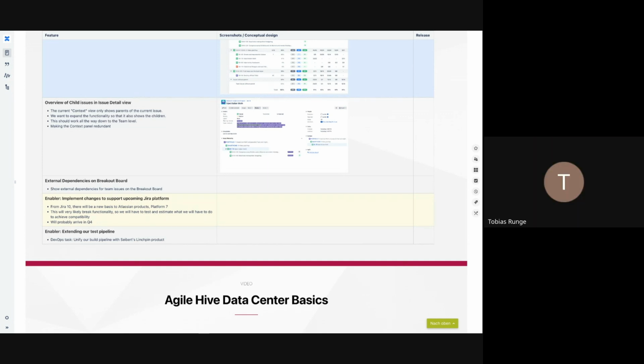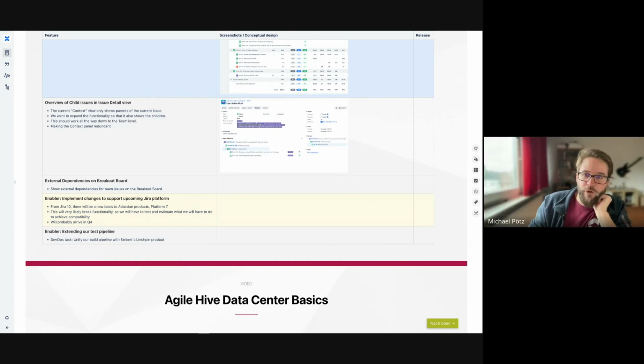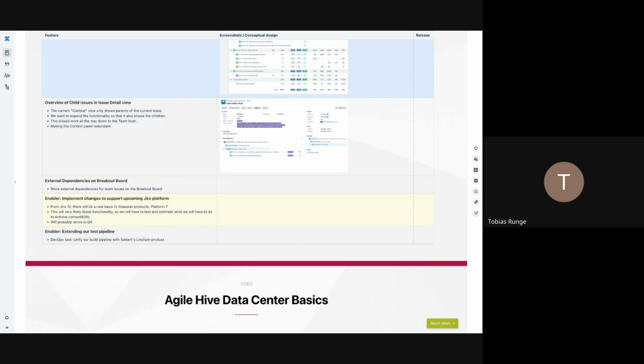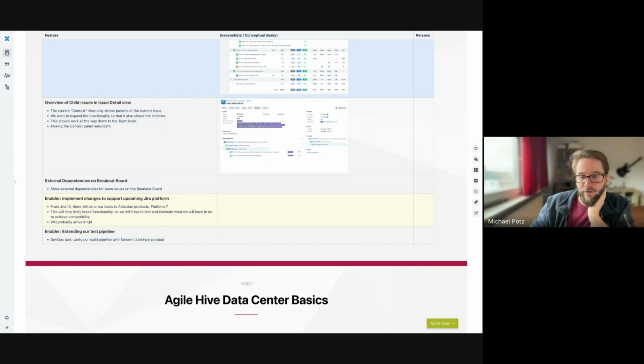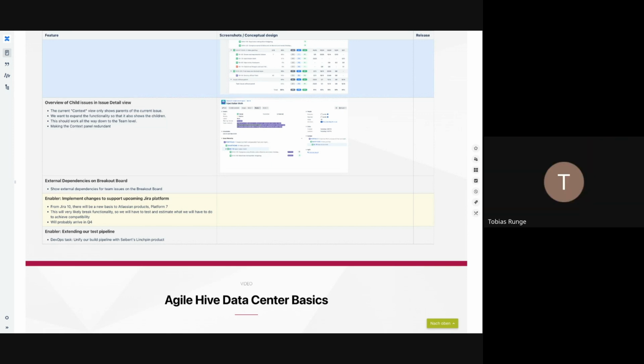Okay. For the ART report, we could show them as the independent lane, because it doesn't contribute to any feature, but it's still effort that the team does. So it should be represented on the ART report because it takes up a quantity of their work capacity, right? Okay. But not as listed beneath a feature. Okay, thank you. Understood. All right.